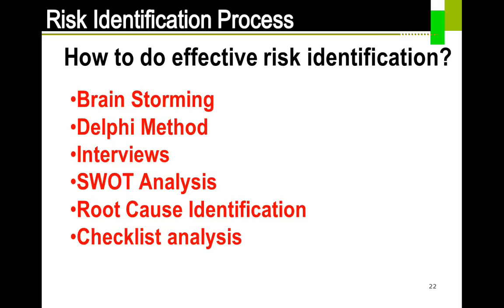However, with checklist analysis, I do have my personal checklist which goes for more than 150 different things when it comes to IT projects. It looks at different scenarios, what can go wrong in a typical IT project, and then you can say whether each is applicable to your project or not. If you say yes, then obviously you need to see why it is yes, and what the different ways are that you can manage those risks.